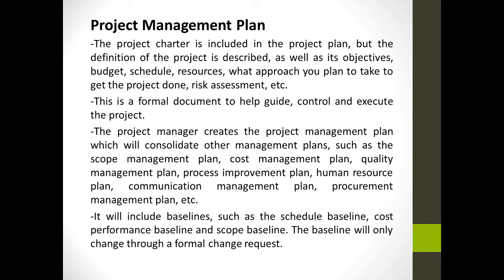The project manager creates the project management plan, which will consolidate other management plans such as the scope management plan, cost management plan, quality management plan, process improvement plan, human resource plan, communication management plan, and procurement management plan, etc. It will include baselines such as schedule baseline, cost performance baseline, and scope baseline. The baseline will only change through a formal change request.